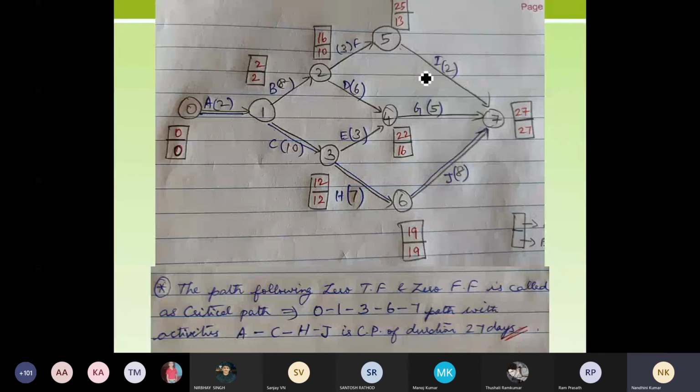And finally, again, I'm going to draw my network diagram. I'm going to mark my activities. And here and after, when you're calculating your free floats, you have to draw this box. It's not just that you write your activity name and duration and plot the critical path. You should mark these boxes and list the earliest start and the latest completion time, and then you have to bold, highlight, or draw a double line on this critical path. Is it okay?